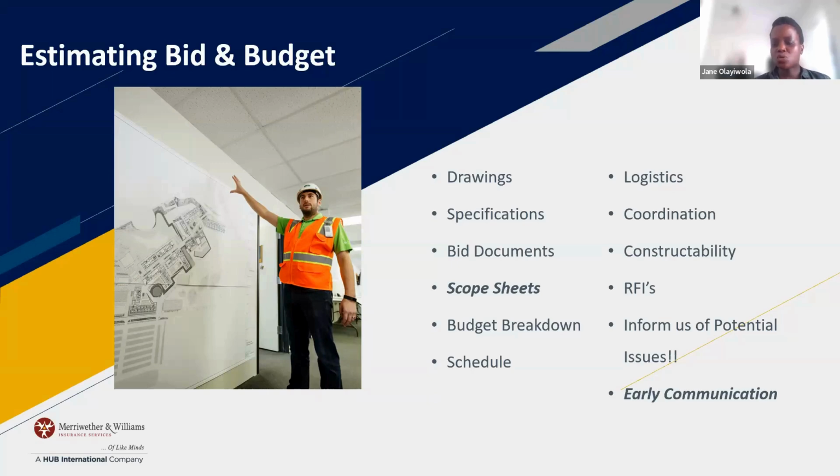But in terms of increasing costs over time, if it's in the bid documents that we are to consider Trump tariffs, or to consider cost increases over the next year, and we don't know what that's going to be, right? We're getting lumber from Canada. It could be as much as 150%. You're buying a 2x4 for $10 now, and you're looking at 150%, you're buying it at $25 in the future. That's a huge cost increase. Put that cost increase in as a separate line item, so that if it turns out we're not seeing a 150% tariff from Canadian lumber coming in, then the client isn't required to pay it.